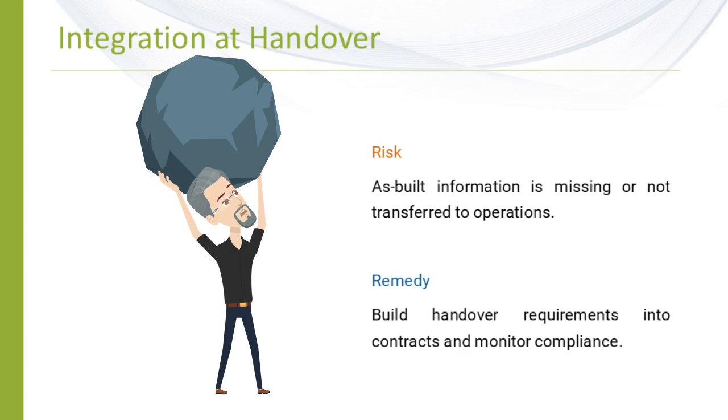So we can build those handover requirements into contracts and monitor compliance to that. But as we said earlier on in asset information standards, you don't want to over-specify to drive behavior. All you're really seeking is what information and data is required that enables me to accept that asset and take it into operations.